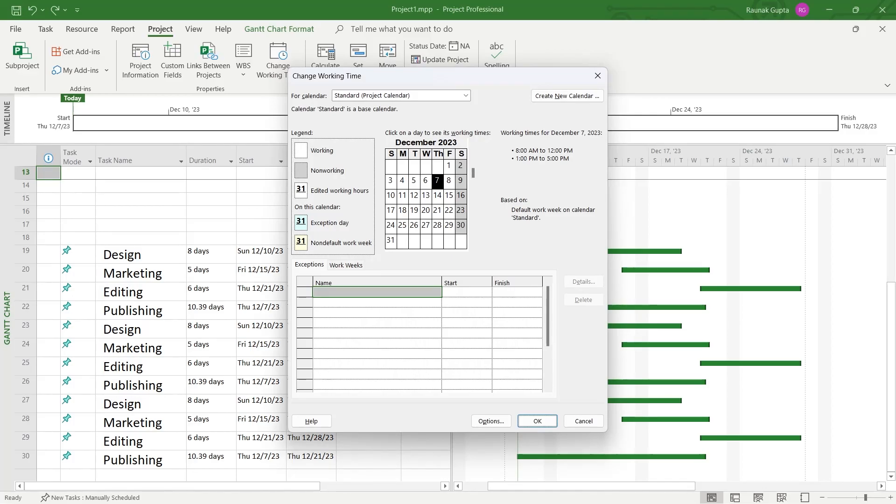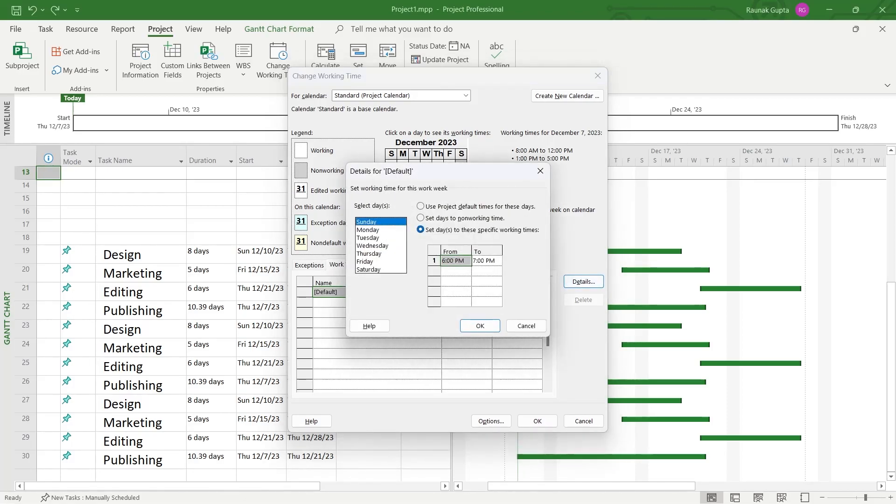In this menu you're going to click on Work Weeks just right here and here we have this default. Click on Details and now select the date that you want to add as a work day. For example, I want the Sunday to be a work day.